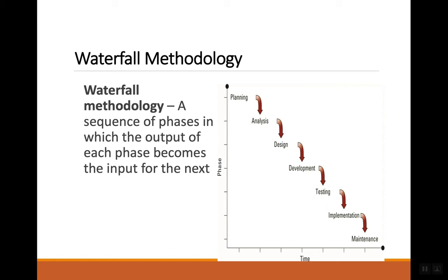So a lot of times you can go through multiple stages of the development cycle and suddenly realize that this may not be what you're looking to do. The solution you're working on might not meet the requirements, and you might not discover that until you get to the implementation phase. So that's one of the weaknesses of the waterfall. I mean, the waterfall is very good in that it applies a level of discipline.